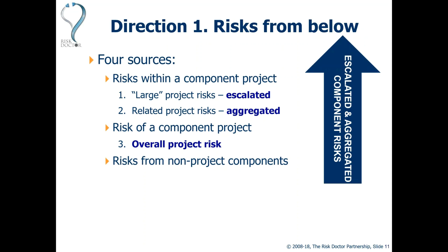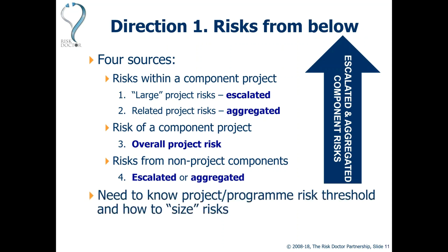And then lastly, the fourth area is components of the program which are not projects. And similarly, if we have large or related risks within non-project components, these can be escalated or aggregated to the program level. So we might just show that on a diagram.